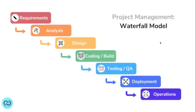The waterfall model I typically see in a healthcare IT space does contain seven phases. The additional phase that gets added is the deployment or implementation phase. In the original document, there wasn't a separate phase for deployment — it went straight from testing to operations. In healthcare, IT projects have such a huge impact on workflow, with significant cutover activity and a warranty period, which is why the seventh phase is added.